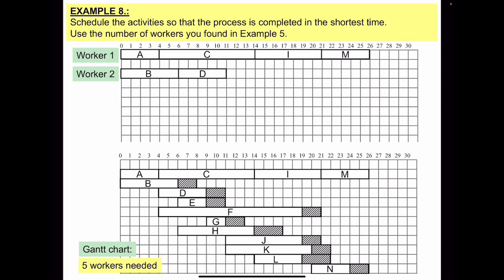D can start if you move D here, if you move it to the right side, okay? And that's why I said you can see there is not only one possible answer, okay? So in this case, I assign D because I can move it, okay? Then the next activity, when D is finished at 11, I can see with the G in here, I can also move G, I can postpone it, and I can start at 11.